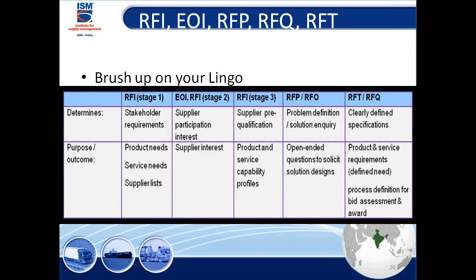Then once I know the needs, I want to do the supplier part. I want to get the expression of interest from them. Are they interested or not? EOI I do it. Then even after doing EOI, if I'm not happy with some information, I could follow with an RFI at stage 3.